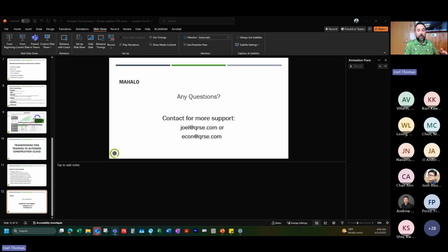So to answer your question, if your contractor is not using either of those formats, it's not following spec. I'm guessing you're saying if they're using Microsoft Excel or something to generate their schedule, I would push back on them and have them put it into either Microsoft Project or P6.